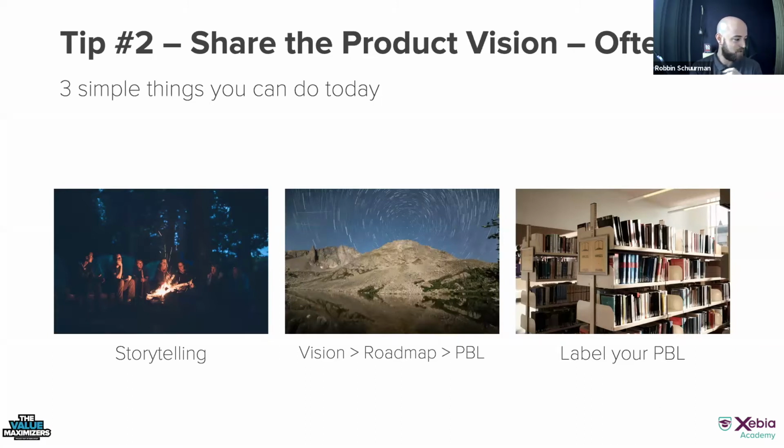And the third practical thing is to actually label the product backlog and to explain also how this product backlog relates to the company strategy. And a great way of doing so is to actually, in your product backlog, just add a card as the first item, which includes your product vision. So make the first item in your product backlog, make that just include the product vision.